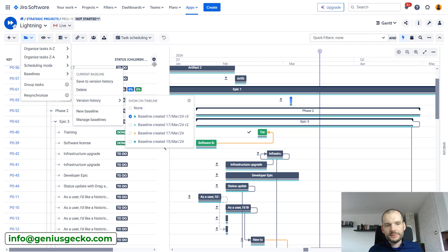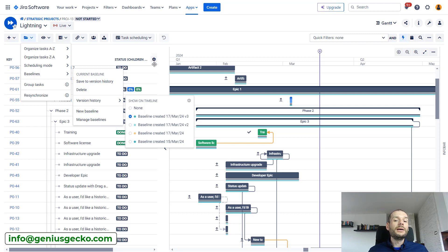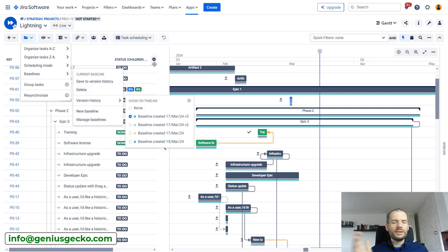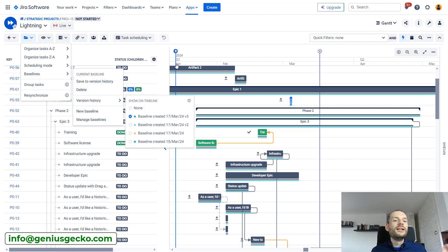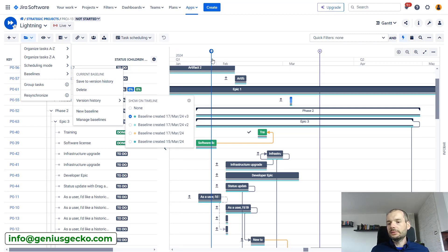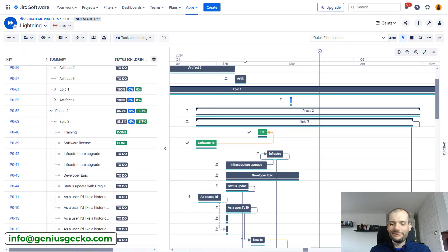Another use case is lessons learned. This feature gives insight into how your planning went throughout the project — how far off you were — and may help you address the root causes of not being able to deliver the initial plan. It provides a detailed record of how the project evolved that can be reviewed after the project finishes, or even during the project.